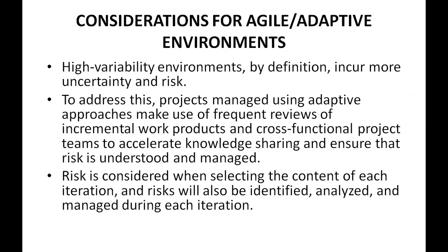Now, considerations for agile and adaptive environments. High variability environments, by definition, incur more uncertainty and risk. To address this, manage the project using adaptive approaches, make use of frequent reviews of incremental work products and cross-functional project teams to accelerate knowledge sharing and ensure that the risk is understood and managed. Risk is considered when selecting the content of each iteration, and risks will also be identified, analyzed, and managed during each iteration.